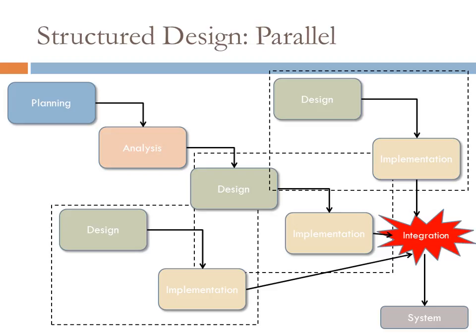And then you engage towards the end, once the subsystems have actually been built, you've done the coding, the testing, and everything else, you want to just integrate all of those subsystems together. Which, if it's not managed well, can be a huge nightmare to actually manage. For one, because if it's not properly managed, you might have different programming standards that might be used. You might use different platforms in these subsystems.